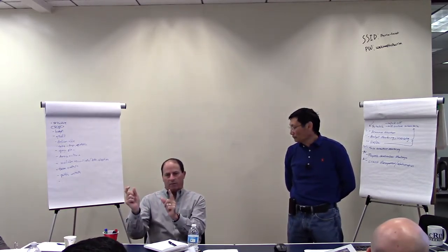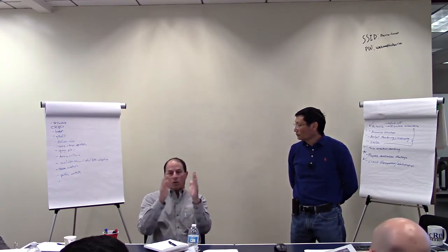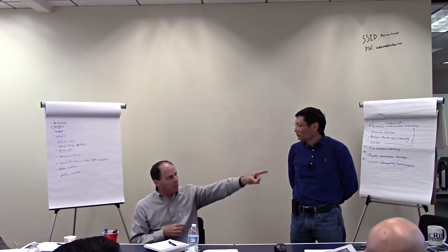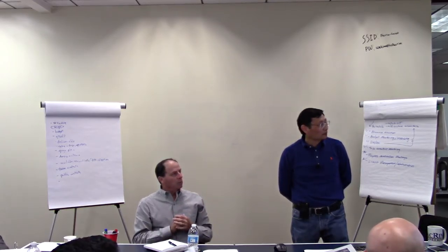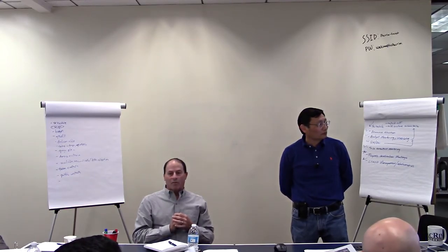I don't worry about the start date initially. I think about what are the things that have to be done, which is why this is tied to the work breakdown structure. What is each thing that has to be done? How long does each thing take? What has to be done before I can do that?